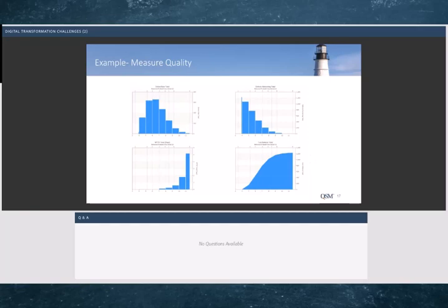We're using models and historical data at the release level. And then we're going to roll all this up to get the overall transformation cost and schedule. And we're going to be able to take into account all the dependencies from release to release, all the different vendors, all the communication issues, all because we're measuring regularly at the release level and then at the portfolio level. And we're taking into account productivity and scope, not just cost and effort, not just how many hours each person's going to work, but at the release level, what's the big picture?